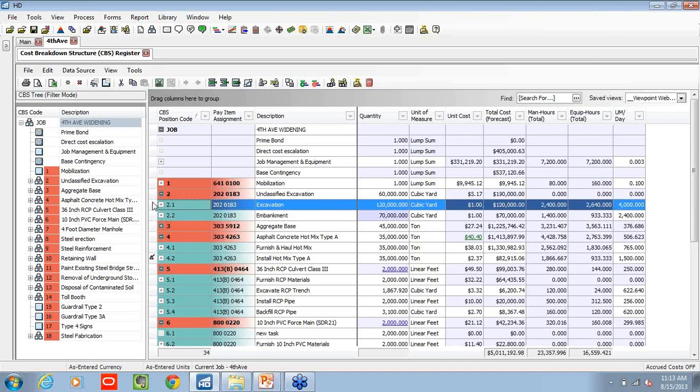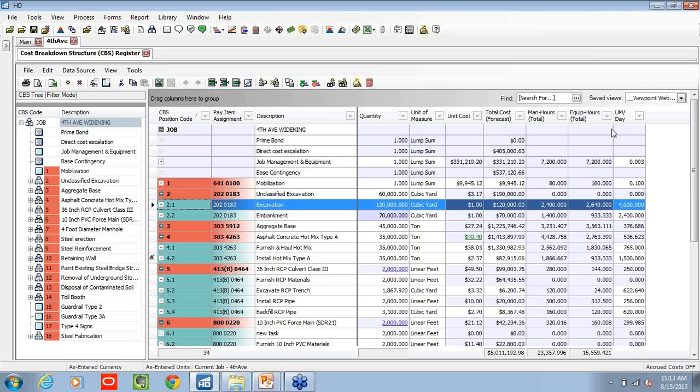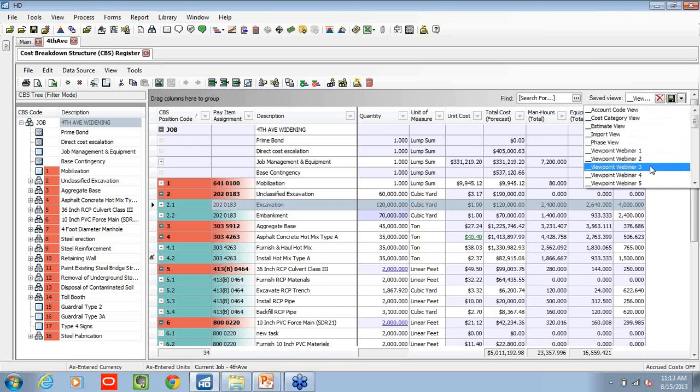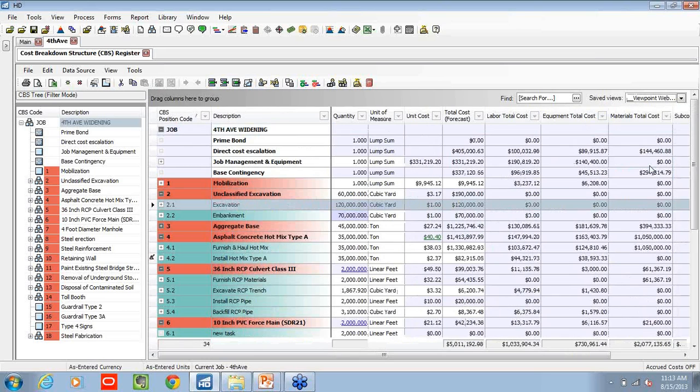So if we look at excavation as an example, we have 120,000 cubic yards, a total of 2,400 man hours, and it looks like we're doing 4,000 cubic yards per day from a production standpoint. So as I vet out these numbers, I can now transition into another view.